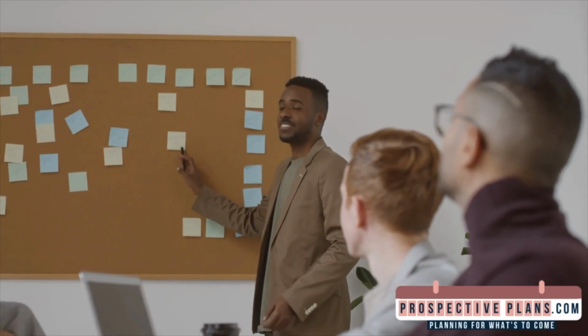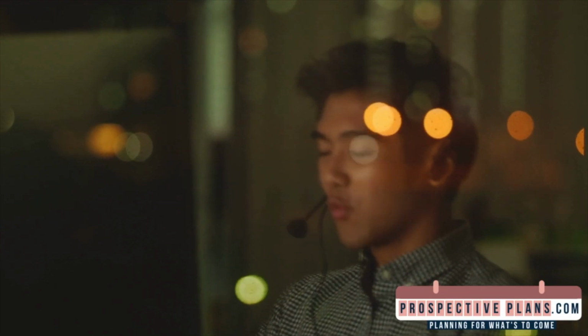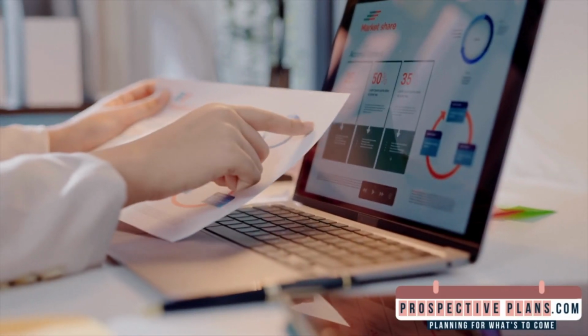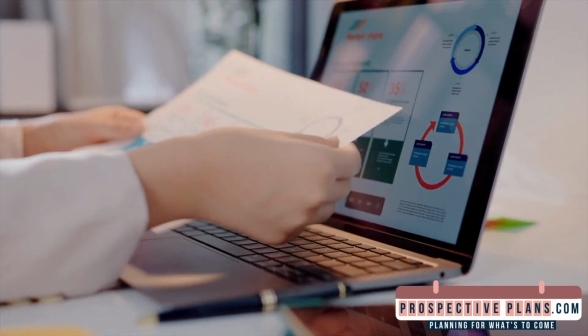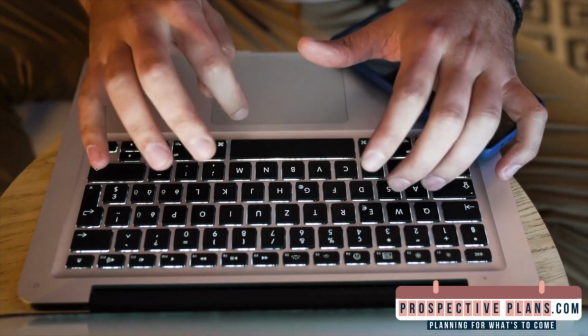Drag an item or a job from the to-do column to doing when you're prepared to get to work. I think it makes sense to have no more than just 3 things in the doing column at a time. This will help you see what you're working on and minimizes the amount of work that you have in progress. Recall the guidelines, of course. Drag a job from the doing column to the done column when you're actually finished. Next, move one more item from the to-do to your doing and keep moving.